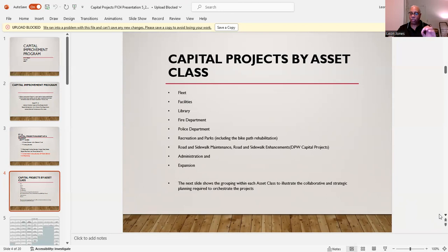Or it's actually administration and expansion. Now, advance is when we advance something, we bring a project, we let a project before its actual let date. This is what we called it in Pennsylvania. Let's say a project was supposed to let May 10th of 2018. Well, something happened. We got the funding or more funding. So we decided to advance it from May to April. That's what advancing is. In other words, we started our project early.